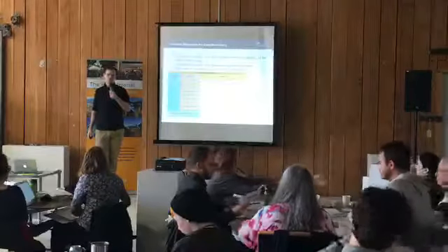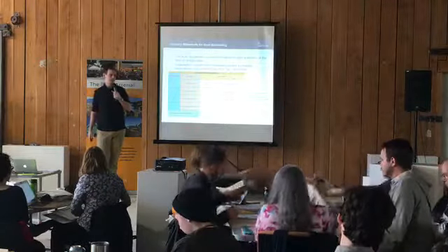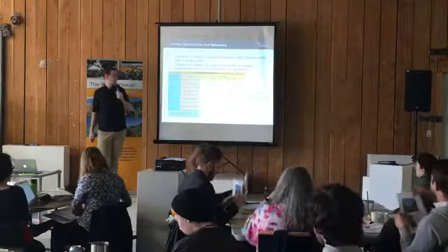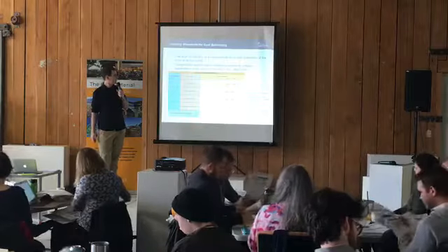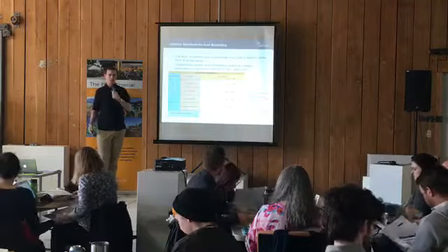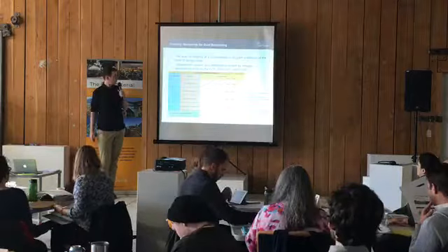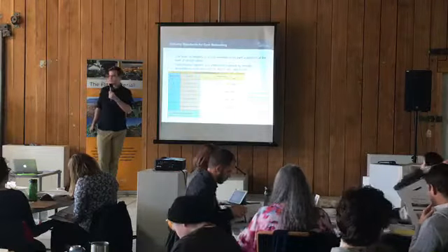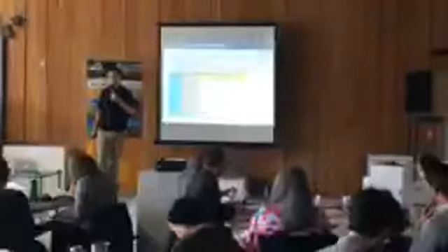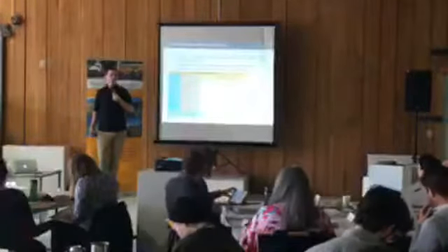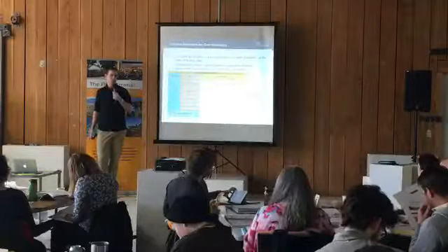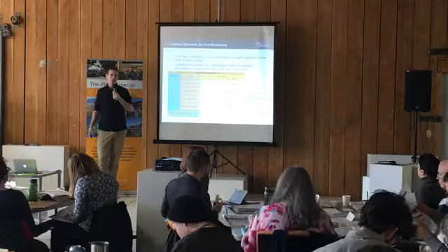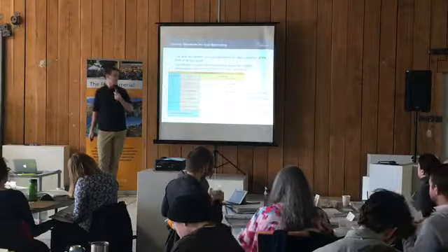Cost estimation is a process, not a single one-time activity, and cost estimates are continuously updated throughout the course of engineering design. So right now we are at the conceptual design or planning phase, and industry associations such as the Canadian Construction Association, the Association of Consulting Engineering Companies of BC, and Engineers and Geoscientists of BC provide a lot of guidance on the level of precision of estimates relative to the level of design detail that is available.